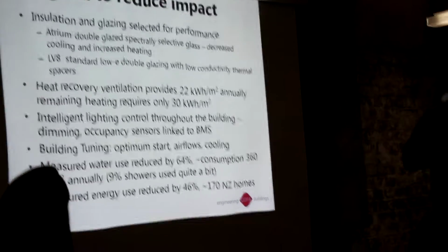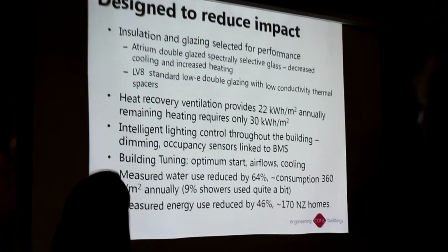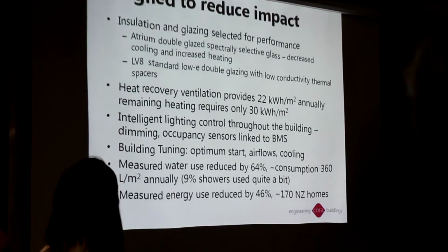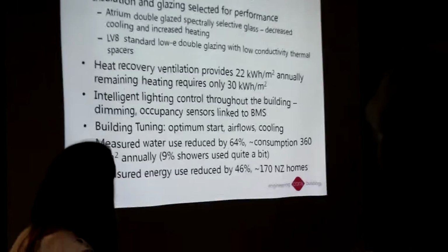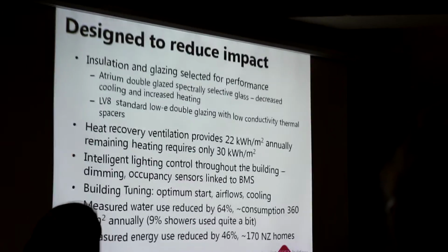Building tuning. During the tuning process, we noticed the optimum start routine wasn't working properly, so we were able to tune that up and fix that. The air flows were tuned too, as we had sections of the building that were stuffier than others. Even though we commissioned the building properly, during the tuning process we were able to go back and fix that because we noticed those problems and could sort them out. And cooling as well, so all those points were tuned.